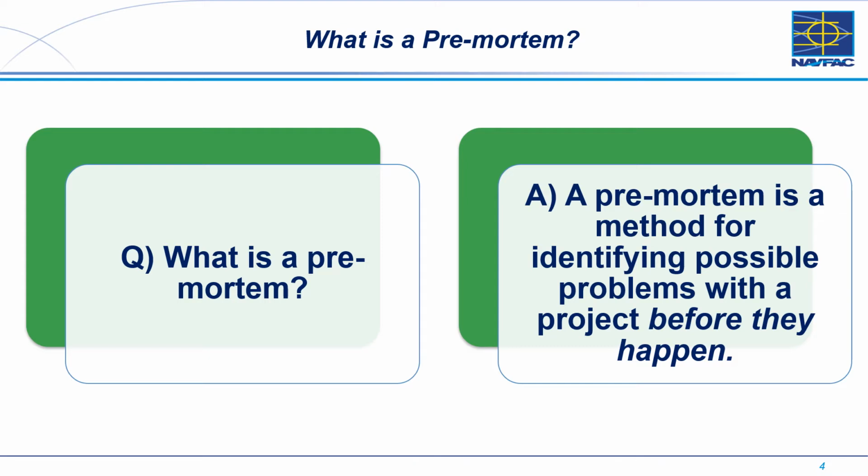You list out all the reasons why the project or procedure failed and the problems associated with it. Next, group the reasons using a likelihood or severity matrix. Solve the problems that are very likely and very severe before beginning implementation or execution. Have a contingency plan for problems that are not likely but very severe. We will go into more detail on this process in our next section.